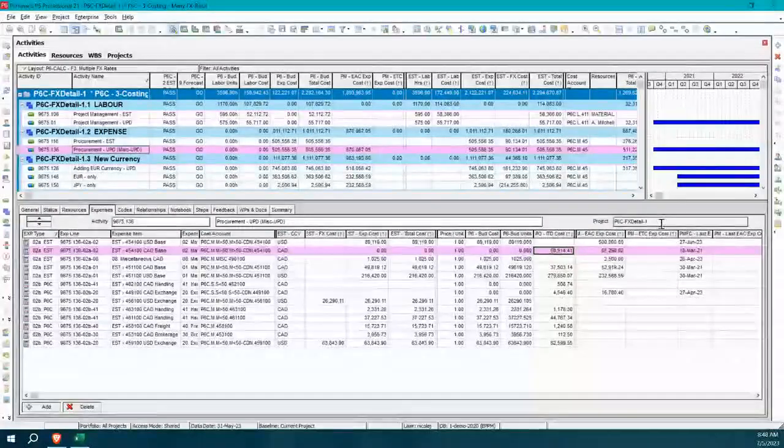So you do want to give your project manager on the expense side some fields as well to put in the at completion and or the estimate to complete. And you may also want to allow them to put in the actual that they want to carry, okay, which can be different than the incurred to date. So that flexibility is there.